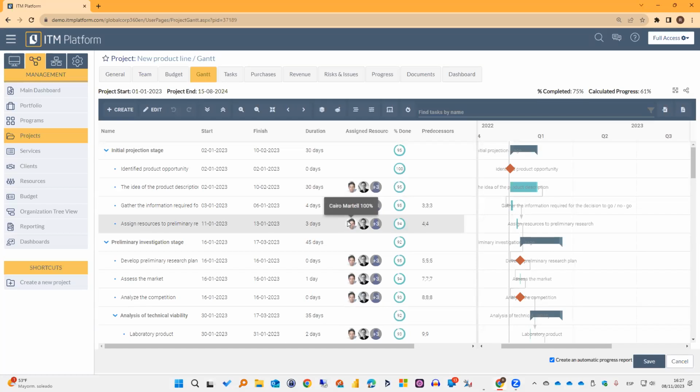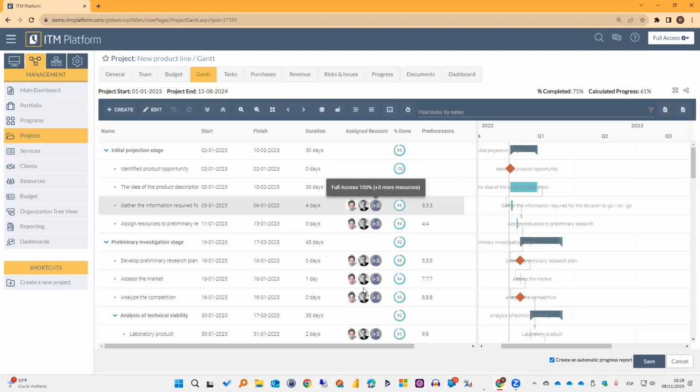So to use the earned value metrics, I definitely require that my team members report on time, right? Well, sorry, not just on time, but also through effort, right? I need to know how many hours they are using. Second situation, I'm going to need rates for my resources, right? So I need to know how much David is costing us, the use of David or the use of Carol or the use of any other resource assigned to this plan.